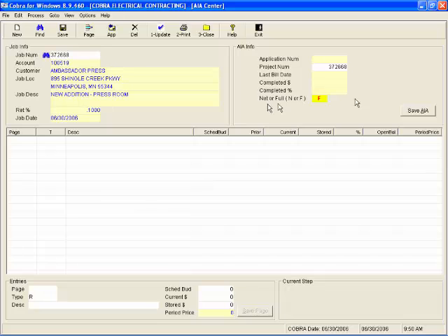And then net retainage is different in that you're going to be sending out a separate invoice, not application, but invoice for the amount of retainage that has been withheld as the job is in progress. So in other words, net retainage means that it hasn't even hit your AR. It's not recognized at all because you have to bill for it separately as its own invoice at the end of the job.